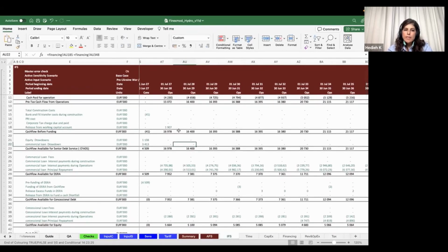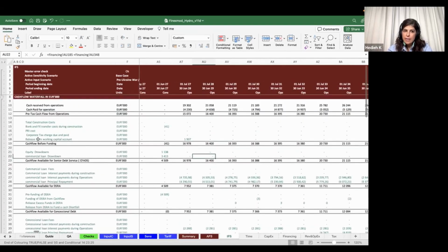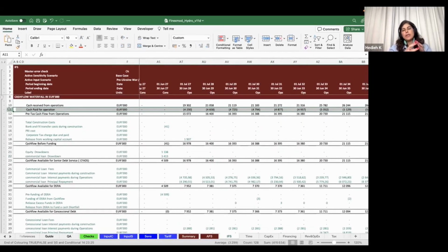So what are the points of negotiation that we discussed? First of all, as I said, this OPEX item is something that, when it comes to the waterfall, you really want to understand. You really want to know who are the people that are ranked first. So when you receive a financial model and it contains only one line of OPEX, like per unit of production, and they use that in the assumption, this is not really acceptable because of the importance of these cash items. We need to really understand who they are, and we need at least a reasonable breakdown of these costs to be included in the financial model.